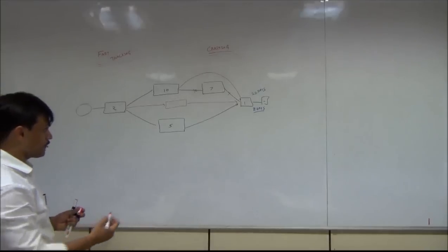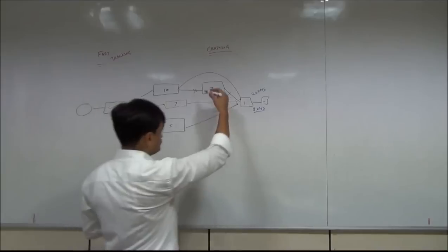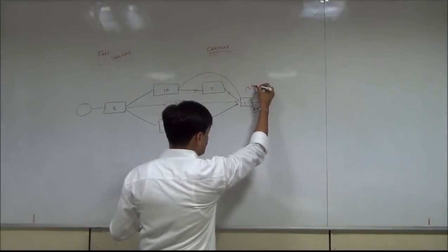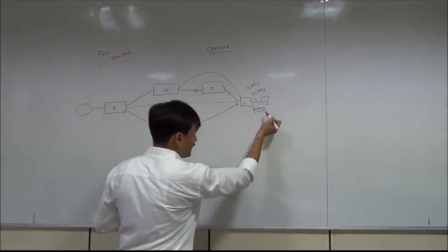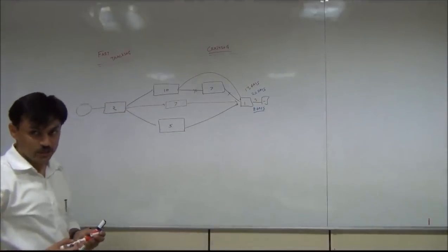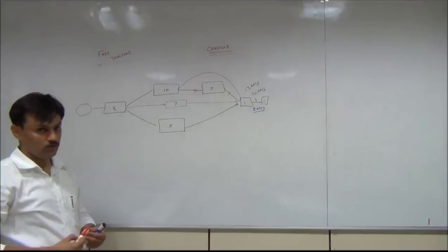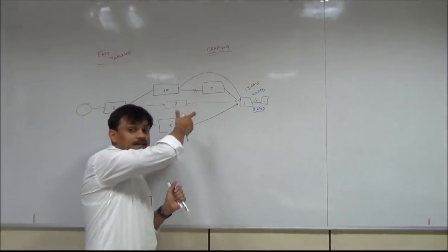If you do that, you get 3 paths. The path 1 is reduced by 7 days, it is coming to 13 days now. And this particular path is 9 days, and then the previous path remains as 8 days. So your project duration is 13 days now. This is fast tracking, where you played with the dependencies.